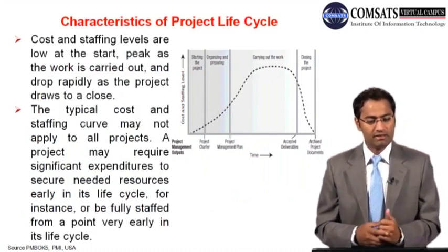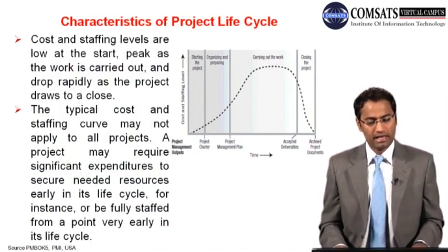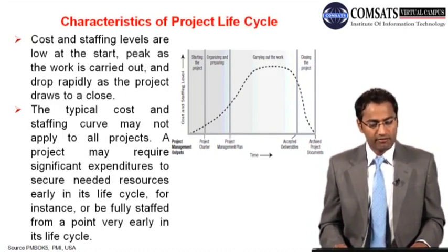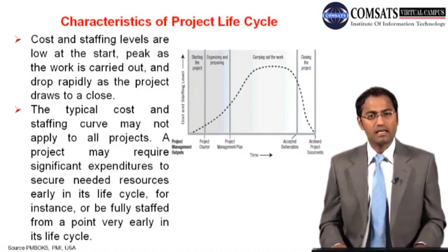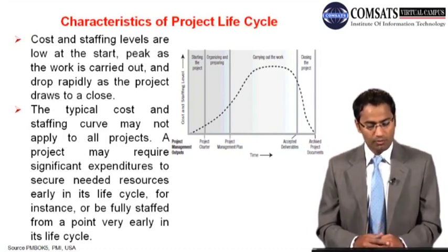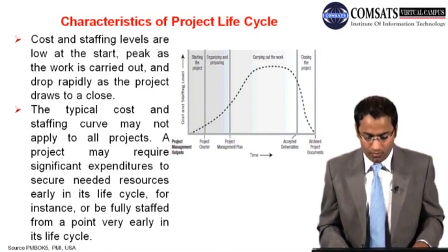So cost and staffing levels are low at the start, peak as the work is carried out, and drop rapidly as the project draws to a close. And the typical cost and staffing curve may not apply to all projects. A project may require significant expenditure to secure needed resources early in its life cycle, for instance, or be fully staffed from a point very early in its life cycle.